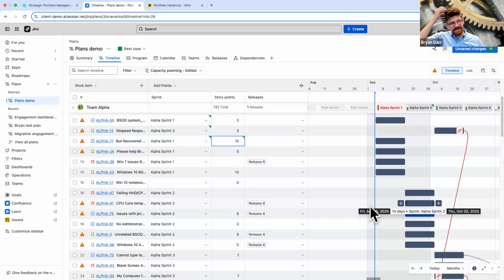Oh, this is team level capacity. So Atlassian's all about teams. It's all about stable teams. If you're wanting to do individual capacity, you're going to need to use a marketplace add-on such as Structure and Structure Gantt or Big Picture and Big Picture Enterprise. And we're going to talk about that in a moment.